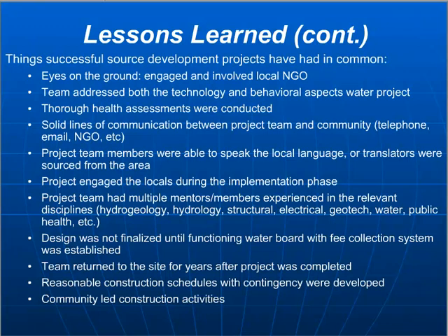Nothing's maintenance free. And then this last example is another one that I already talked about, to highlight the importance of the dry season flow, where it wasn't measured. They used wet season flow, and then the project, after Rotary had donated $80,000 towards it, had to be redesigned.